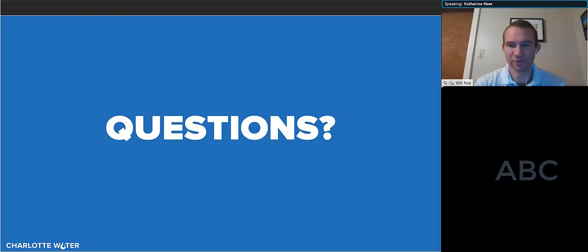We got a question from Jewel over at Carvana. So for the most part, we're going to go ahead and do the actual full construction of the pipeline all the way up to Clanton before we start doing any of the connection tie-ins. And then once we activate that line, once we've tested that line, make sure that all the water in that line is good, and start doing the activations, then we'll start reaching out to all the businesses and determine when we're going to do their outage. But that won't happen until like January, February, and that outage would be a short water outage. But we can definitely discuss that. In some instances, we might just do those connections at night as well to avoid interruptions to the businesses.